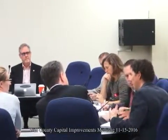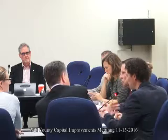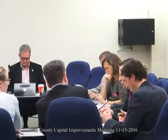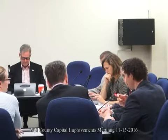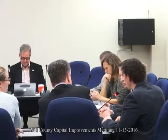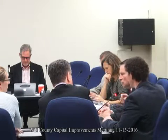Michael? Yeah, so from a commissioning standpoint, we're working with DLR currently. As you know, we're trying to develop this OPR kind of retroactively, right? We didn't have it developed in the design phase, so we're really trying to gather enough information from past decisions and discussions and get that documented at this point in time in the OPR. And then we can kind of move forward. One of our goals too is making sure there's consistency across this building, but other facilities, like the courthouse, making sure that decisions made on product type or hot button issues with your O&M staff are really being vetted so that those things get in the OPR and get on these projects.